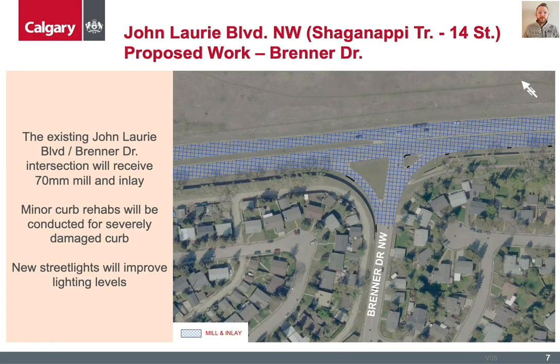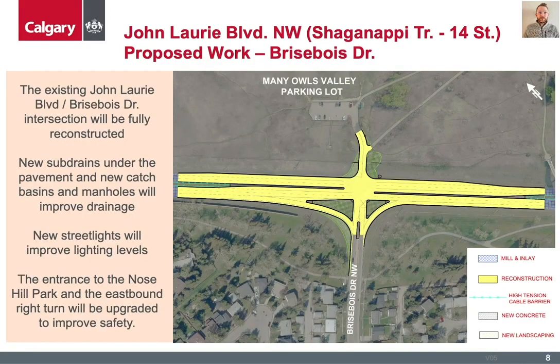Rehab of the Brenner Drive and John Lurie Boulevard intersection will be completed through mill and inlay of the intersection to the south limit shown on this image, as well as the removal and replacement of severely damaged curb and gutter. The intersection will also receive upgraded lighting to improve lighting levels and the safety of the intersection. The largest section of rehab along the project will occur at the Brisewa Drive and John Lurie Boulevard intersection. For those that use this corridor on a regular basis, you will likely know that this section of John Lurie Boulevard is in the worst condition. Due to the existing condition of the pavement and the underlying cause of deterioration, mill and inlay was not a suitable option for rehab, unlike the other areas along the project.